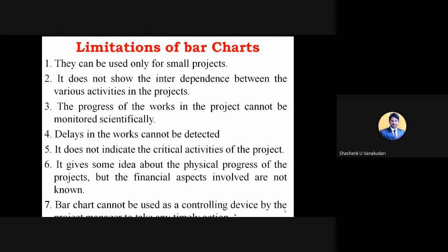That is what we need to find out in project management, but we cannot be satisfied by using these bar charts, because when the number of activities is more, and when we don't have interdependency from one activity to the other, it is very difficult to find out where exactly we are lagging with respect to time. And it does not indicate the critical activities of the project.